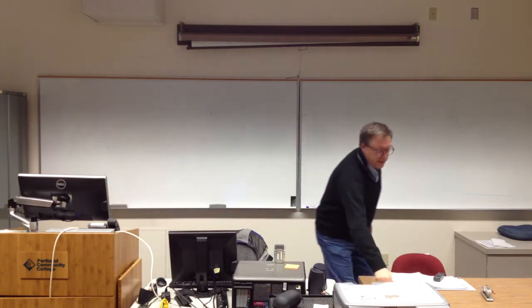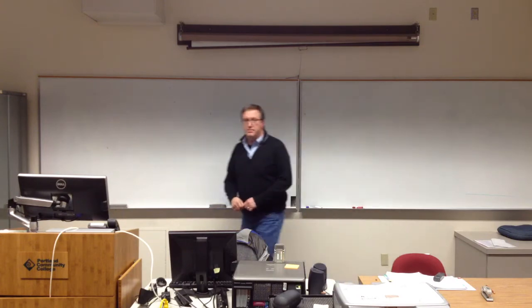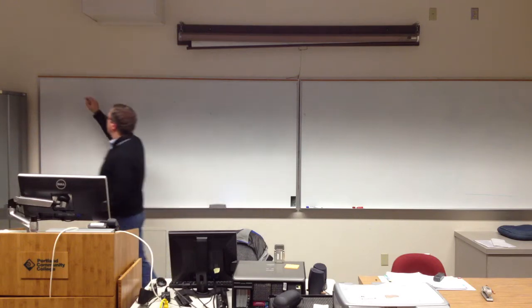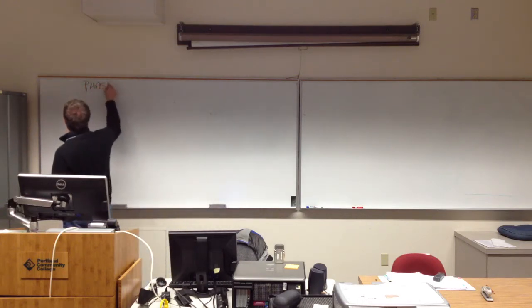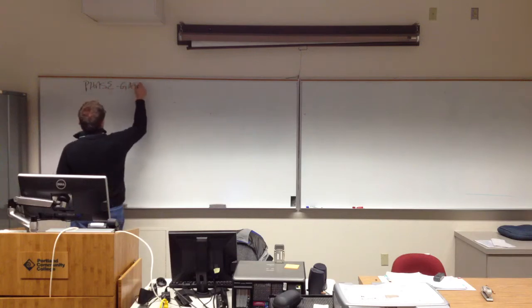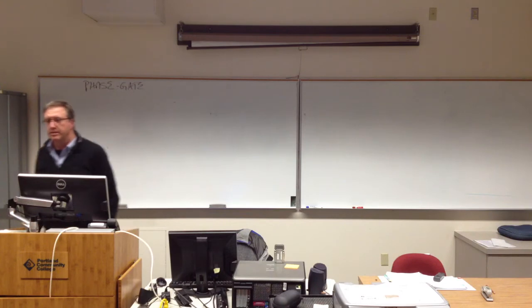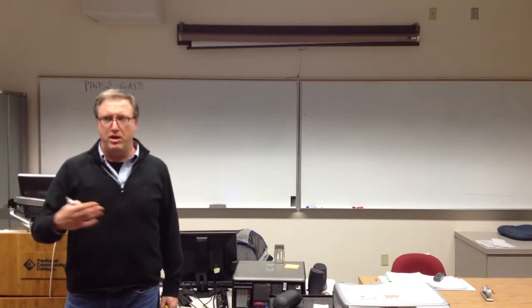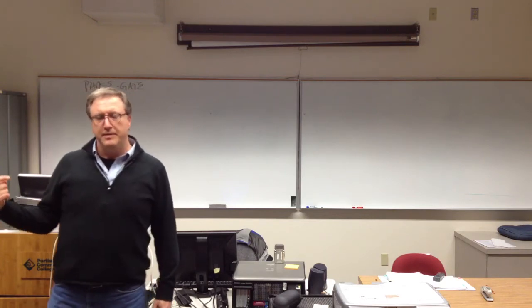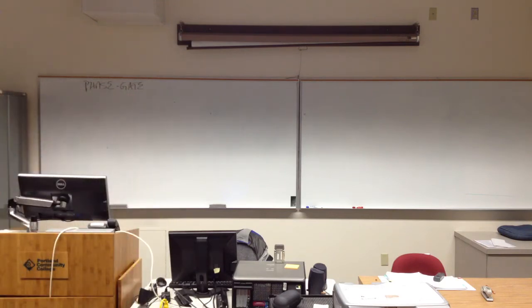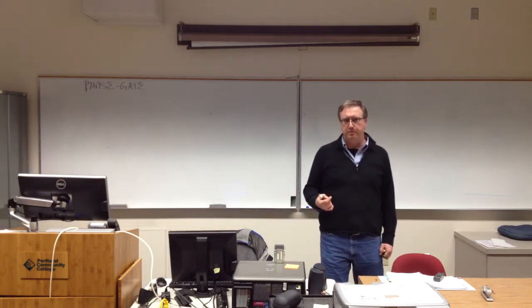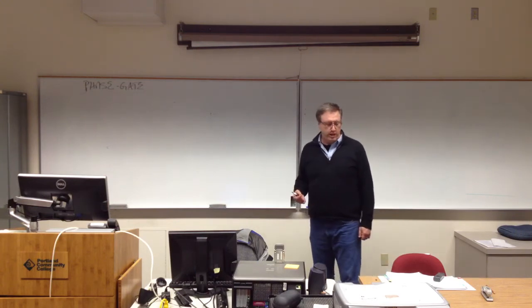Okay, shift gears. Let's talk about the system design life cycle. This is a phase gate approach. This is a repetition of what we covered in 120. There are multiple phases, and there's a gate in between each one. You don't get to go from one stage to the next unless you've met all the criteria for the previous stage. At any stage, someone can look at your plan and say, no, this isn't working. We've got to shut this puppy down. We've spent enough money. This is a bad idea. It's a wonderful way to work.